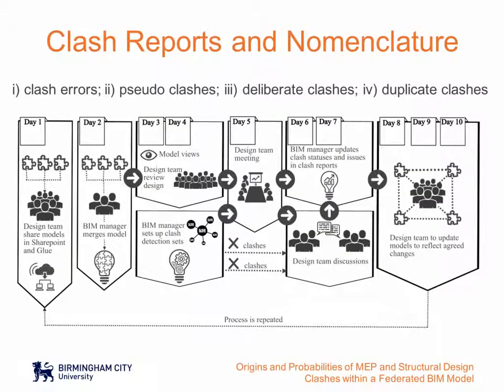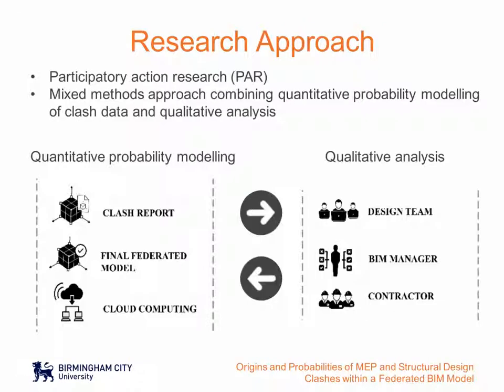In this particular study, it was observed that members of the project management team produced designs that were subsequently integrated by the main contractor into a federated BIM, where clash detection was conducted on a fortnightly basis. It is this process that sets the scene of investigation for probabilistic modeling and qualitative data collection with the project management team members.